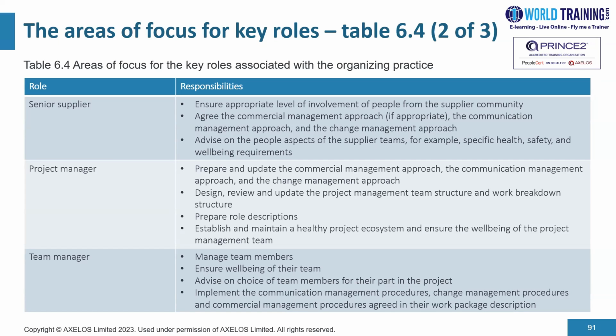When it comes to the project manager, the responsibilities would include preparing and updating the commercial management approach, comms management approach, and the change management approach, designing, reviewing, and updating the project management team structure and work breakdown structure, preparing role descriptions, establishing and maintaining a healthy project ecosystem, and ensuring the well-being of the project management team.